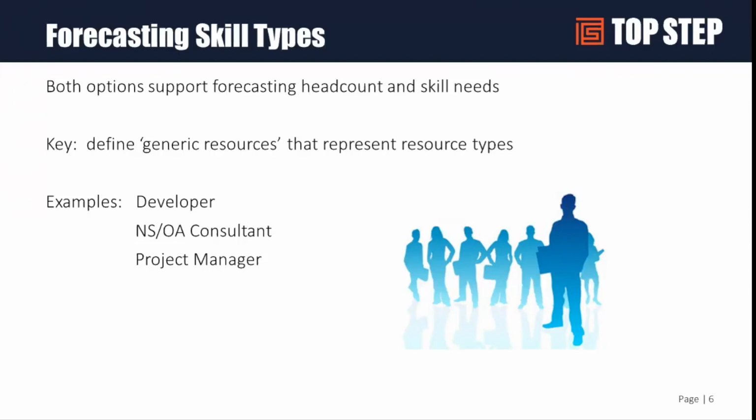of resource I need. There are skill profiles and ways that you can set up generics to have a whole skill profile, and rely on skill profile or skill elements in searches that are available, the advanced resource search, where there's some enhancements that have been released. That's a secondary layer. But at a very basic level, if you call the generic the type of resource that you need, that gives you insight into how much or what kind of resources you need to fulfill the job when it gets actually signed by the customer.